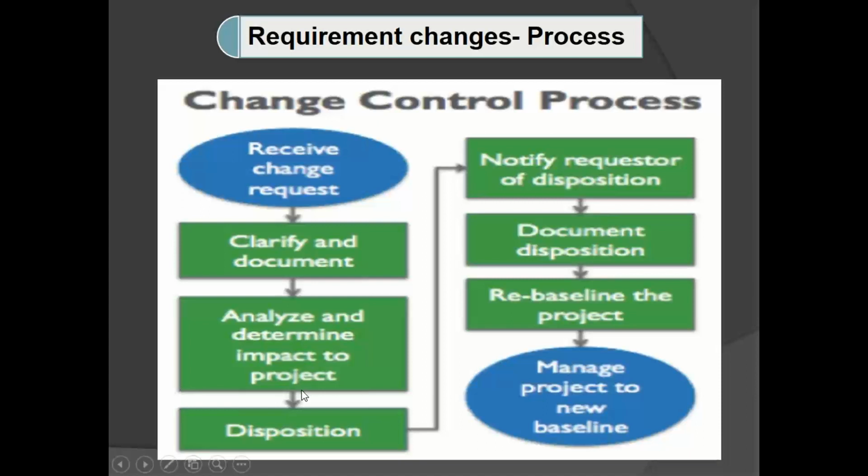Second one is clarify and document. Then analyze and determine the impact to project. Okay. Then disposition and notify requester of disposition, document disposition, rebaseline the project and manage project to new baseline. Okay. So these are the steps which we have to do in change request process.